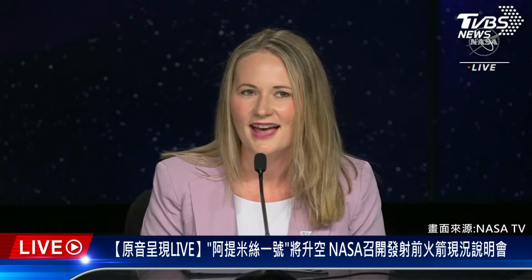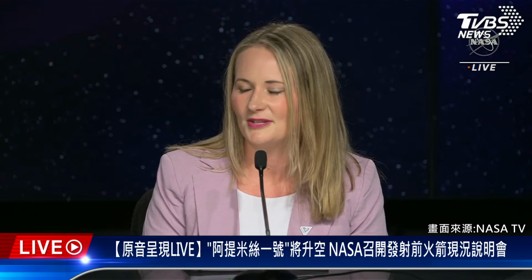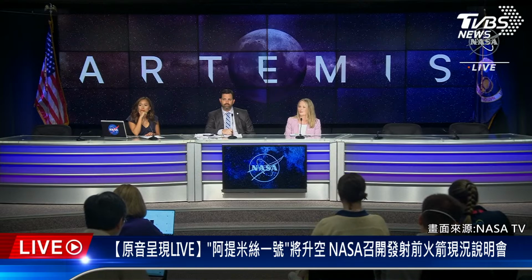Those are excellent questions. I don't have the exact stats that you're searching for. I can get back to you with that. I can tell you, though, that on any given day, there's about a 1 in 3 chance that we will scrub for any reason. And out of those chances of us scrubbing, there's a 50% chance that it's due to weather. So hopefully that's some stat you can take back. Could you remind me of the second part of your question? Yes, I was asking, is there a chance that we might have to wait a while for a good opportunity to launch, given that it's a 60% chance favorable?